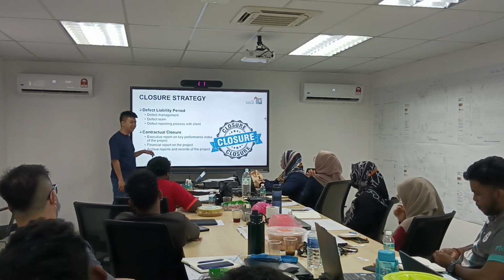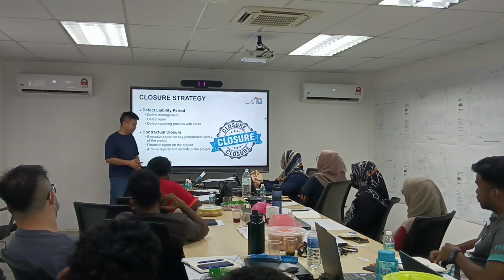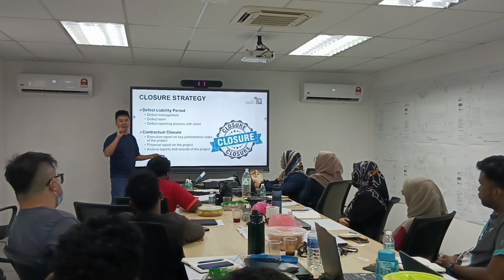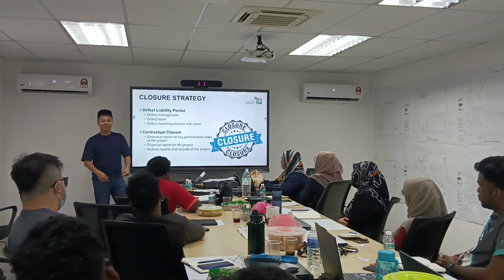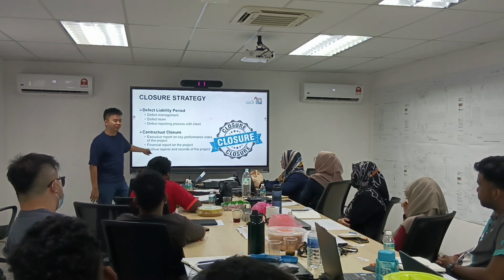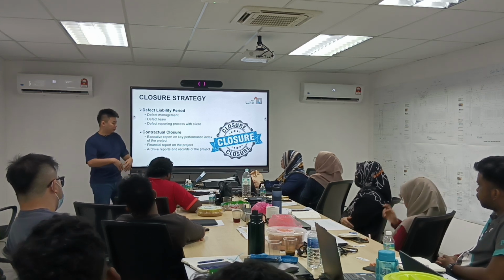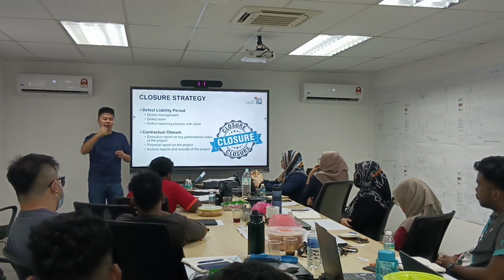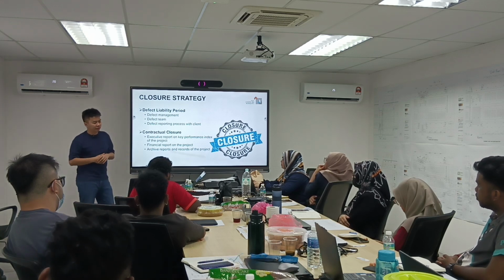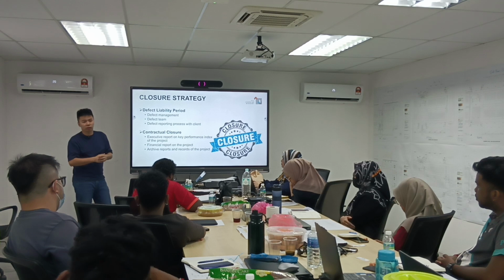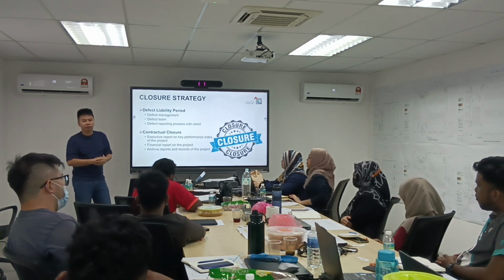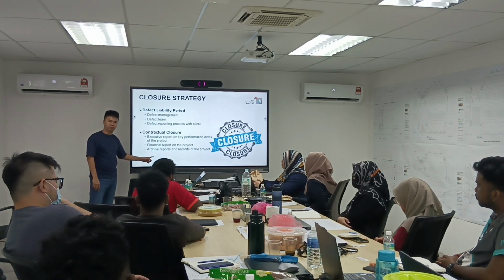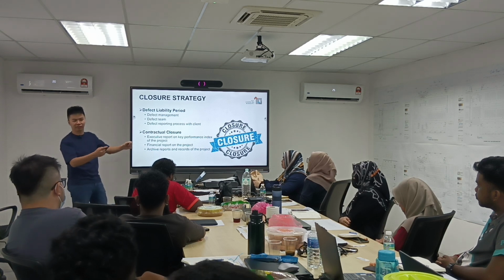Okay? And then as an established company like us since 1955, all the reports and records in the project shall be archived. You don't go and throw and burn it, use it like your cooking paper or anything. So you need to archive it. The reason being is that being a good and experienced contractor, like let's say 3 years down the road, someone from the project asks you, hey, Shama, this genset, so now I suddenly realized got this issue. This bus bar is loosened. So are you actually during that time your installation you got checked or not? Go to your archive, find the inspection report and show him, sign off by the cloud.